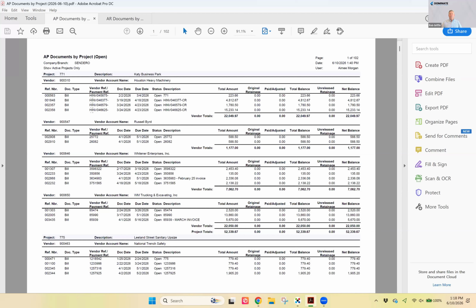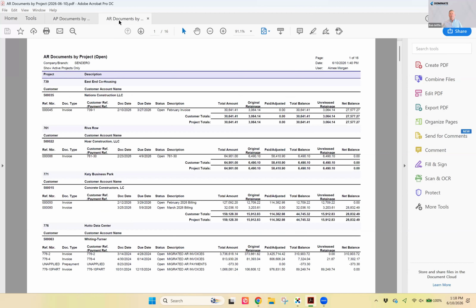So it's hard to drive revenue and hard to control cost, especially on the AR side. If you're managing the projects and doing everything right, but those customers are not paying on time and that AR is mounting up, then now you've got a revenue shortfall at some point in the future, which is going to create problems all across the business.